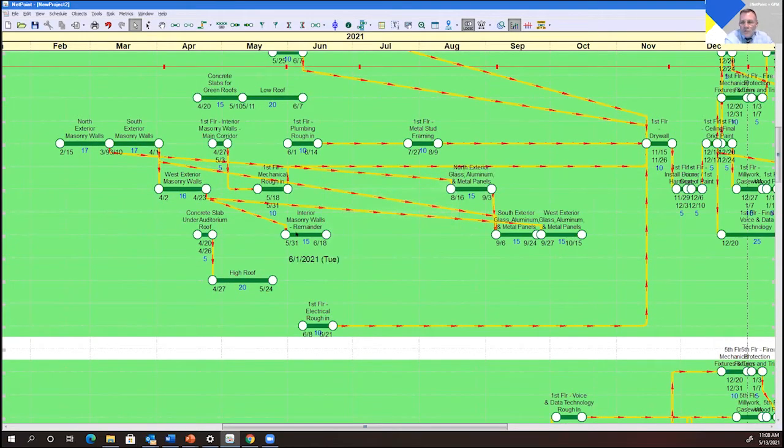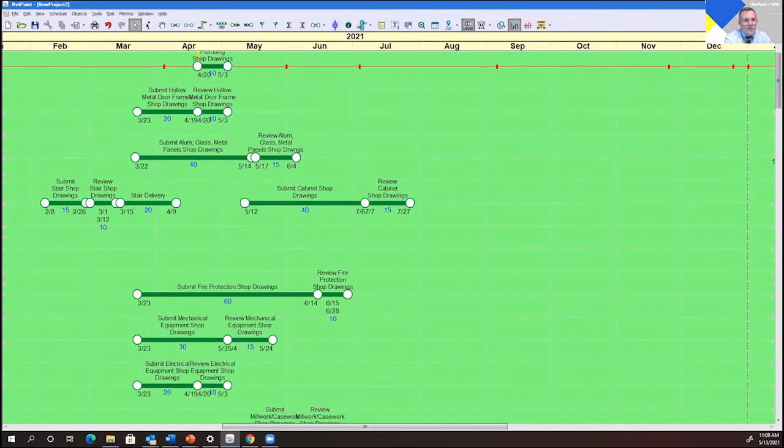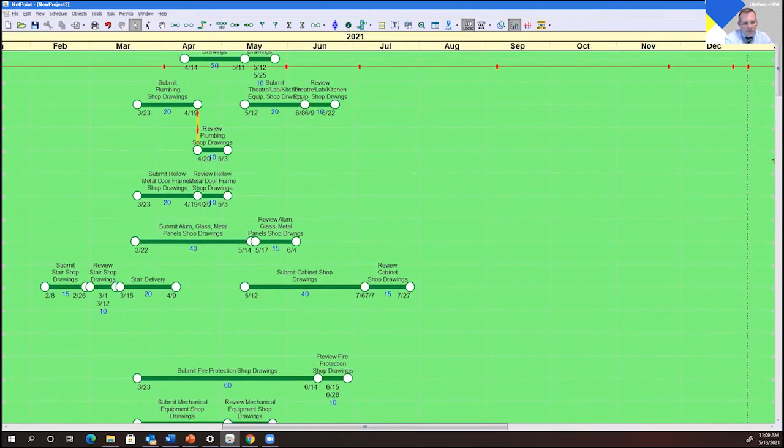And so you can tell that the inherent algorithmic way of resorting the schedule has tremendous advantages, because you can take larger schedules and break them down in understandable chunks. You can arrange the activities in the schedule based on any coding system that you can imagine. And I think I already mentioned trades and geographic location and things like that. So all these WBS elements are being pulled in from a P6 XER. And we just automatically pick the default color that was in the WBS from P6.